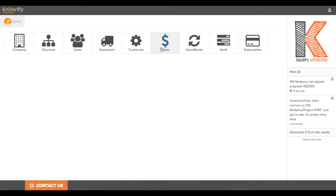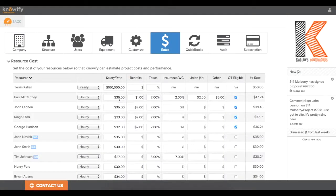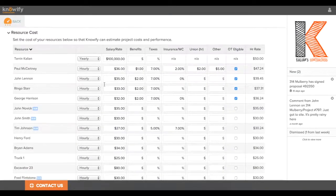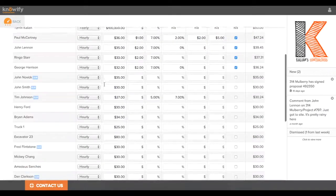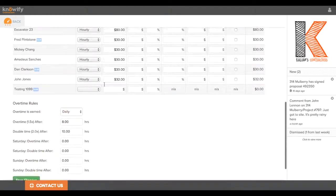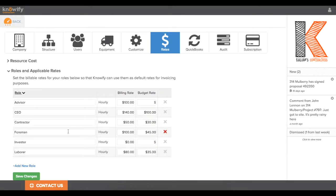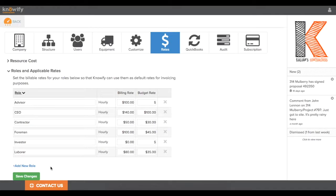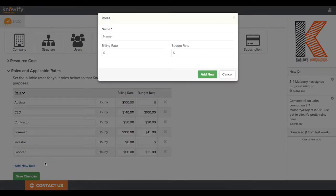When we're in the admin section, I want to go under my rates tab. You'll see all of the rates for the different workers that are in your system, but at the bottom, you want to go to roles and applicable rates, and this is where we're pulling in that list of different types of worker. You'll also see the billing rate, which is what you would charge for time and materials, but more importantly for our service templates, the budget rate. That's what we estimate as the cost for every hour that we need a foreman or a laborer, whatever the type of worker is on the job.